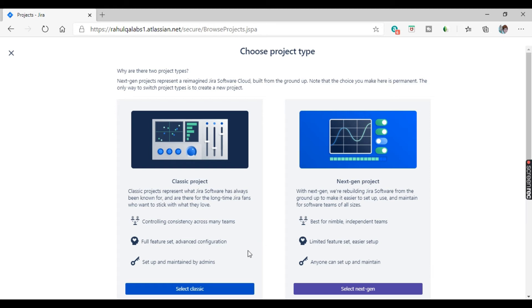The differences you can see are listed here. Classic projects can be set up and maintained by admins only, whereas next gen projects can be set up and maintained by anyone. Next gen has limited feature sets and easier setup, but classic projects have full features and advanced configurations. Next gen is basically for small and independent teams, but classic is for big teams and controls consistency across many different teams.